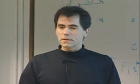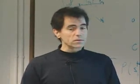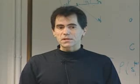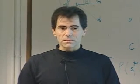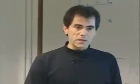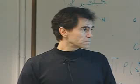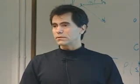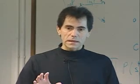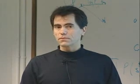And so, as is typical, the iteration process begins with headquarters to change the parameters of the mission, to, in a sense, compromise the scientific objectives a little bit in terms of implementing a requirement set. And the result is, finally, you get something that you can pay for and that still meets the intent of the scientific objectives. So that's a key lesson to learn, is that when you're first starting out and you're first crafting what you want to do, expect it to change. And the key there is it's usually cost-driven as to what you can afford.